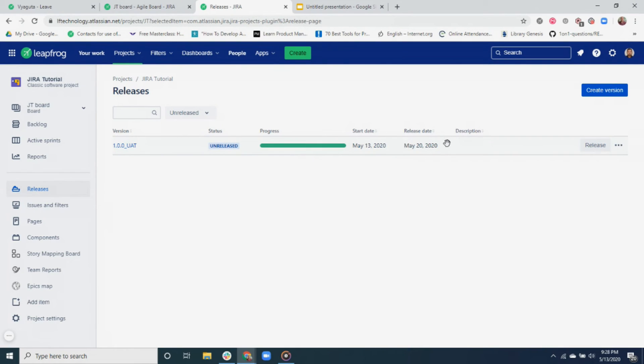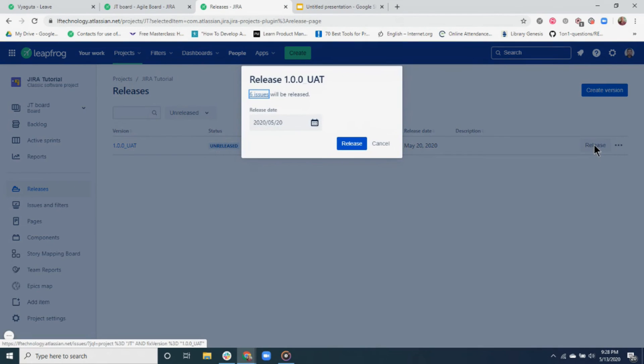After all the tickets are completed and ready for UAT deployment, we can click on the release button to release a version. You can add or modify a release date before releasing it.